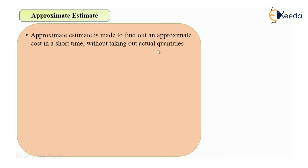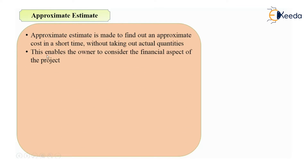Remember, you are not finding out the actual quantities of various items of work. Instead, from your experience, you can say that in a particular locality the cost of construction per square foot or per meter square is a certain amount, and from that you can find the probable cost of a particular structure in a short time. So approximate estimate is made to find out an approximate cost in a short time and without taking actual quantities.